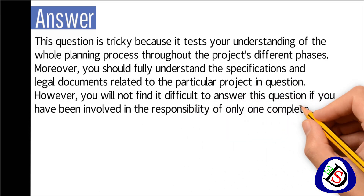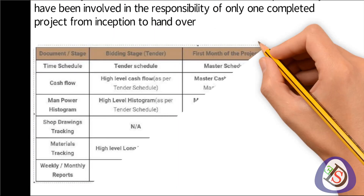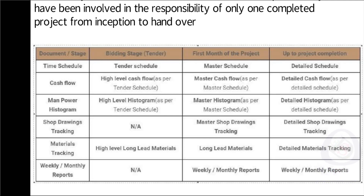You will not find it difficult to answer this question if you have been involved in only one completed project from inception to handover. Here is a table with four columns: Document, Bidding Stage, First Month of the Project, and Up to Completion. The first row covers time schedule: tender schedule, master schedule, and schedule. The second row covers cash flow: high-level cash flow as per tender schedule, master cash flow as per master schedule, and detailed cash flow as per detailed schedule.